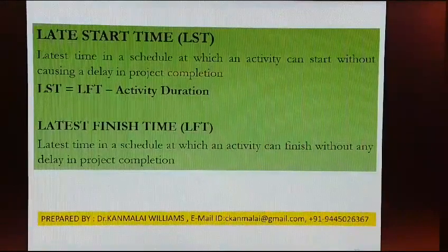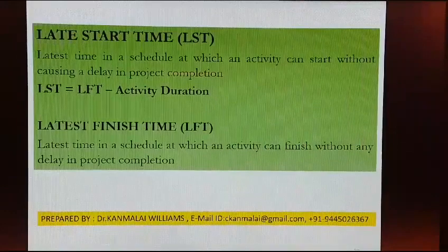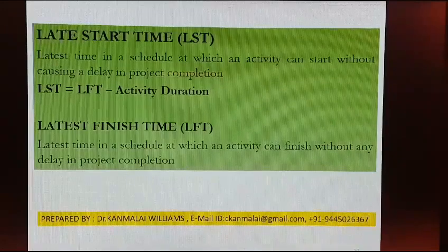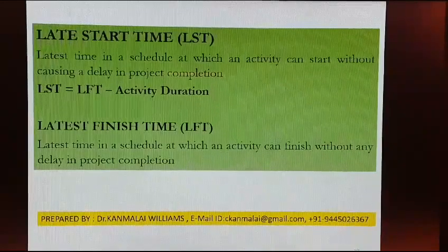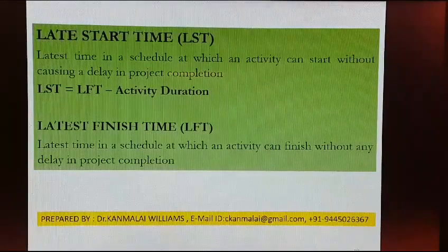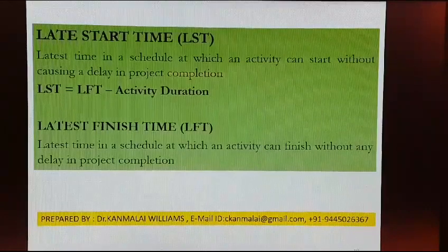It is the latest time in a project schedule at which an activity can start without delaying the project completion, and it is denoted by LST, which is equal to LFT, latest finish time, minus activity duration.